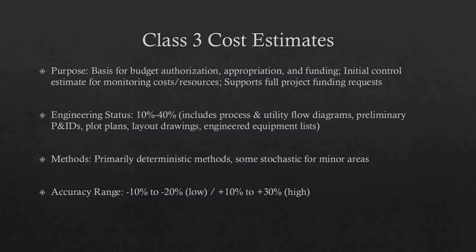Class 3 estimates are used as the project budget until replaced by a more detailed estimate. In many owner organizations, a Class 3 estimate may be the last estimate required and could form the only basis for cost and schedule control. Class 3 estimates usually involve more deterministic estimating methods than stochastic methods, with a high degree of unit cost line items, though these may be at an assembly level of detail. Typical accuracy ranges are minus 10% to minus 20% on the low side and plus 10% to plus 30% on the high side. Ranges could exceed those shown in unusual circumstances.